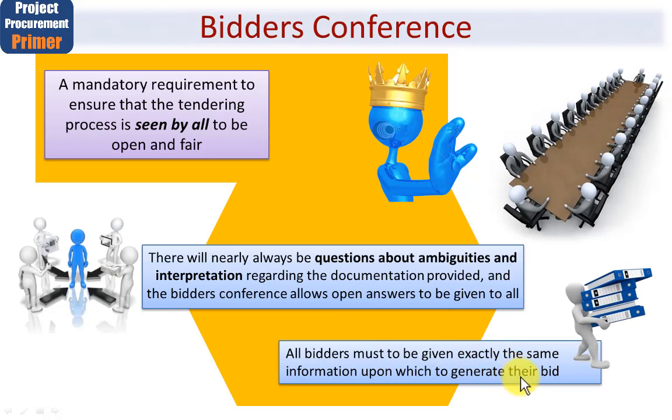So it may well be, if your procurement is fairly straightforward, that you may not have a physical bidders conference, but you may do the whole thing via email because that's most appropriate. But there's no doubt about it, having everyone sat around in the same room face to face is a very efficient and effective way to clarify points quickly and easily. After all, normally such tenders are given out with quite an aggressive timescale by which each supplier has got to give their response. So a bidders conference can get it all done, as I say, typically in a morning.